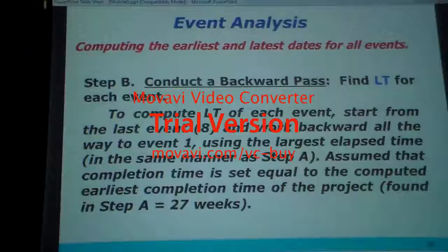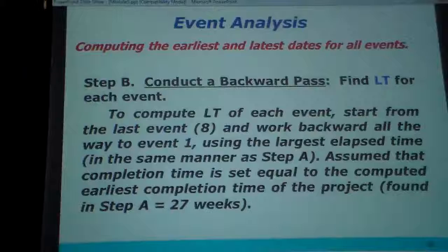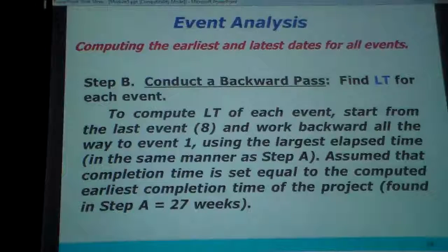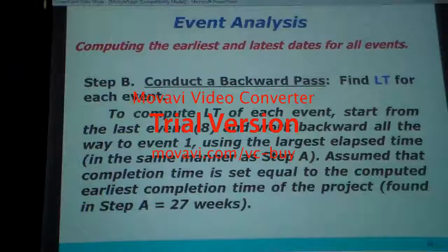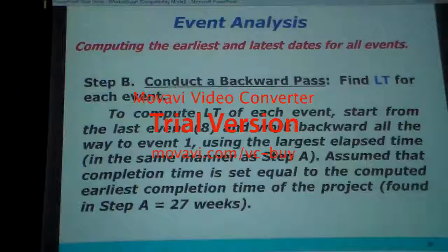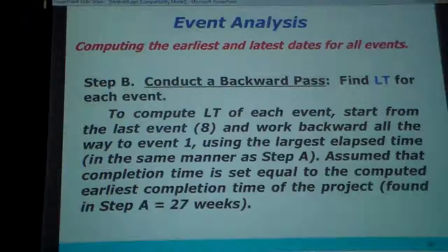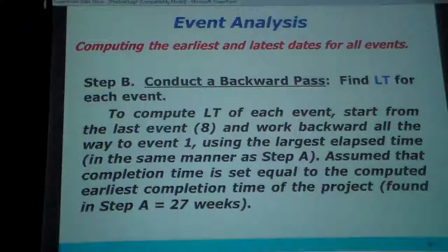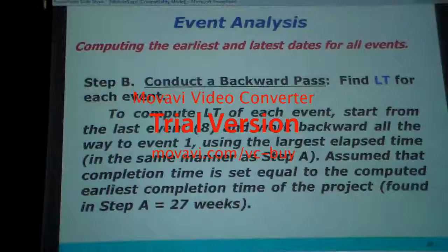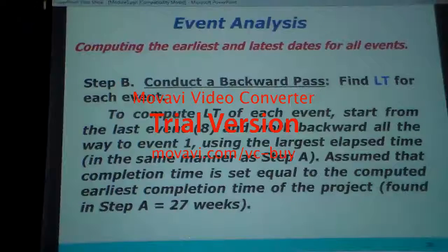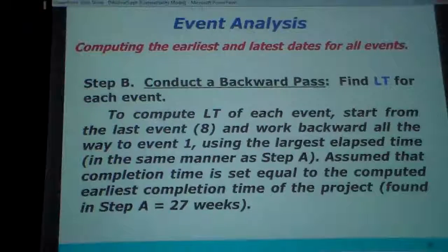Step B — conduct a backward pass. Then every time we have to go from this side to this side. Backward pass — we have to work to calculate late time. As I told you, we'll solve two examples and calculate this. To compute late time of each event, start from the last event — number 8 — and go forward all the way to event one, one by one until it becomes number one.